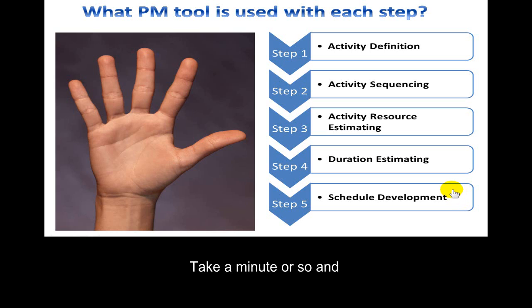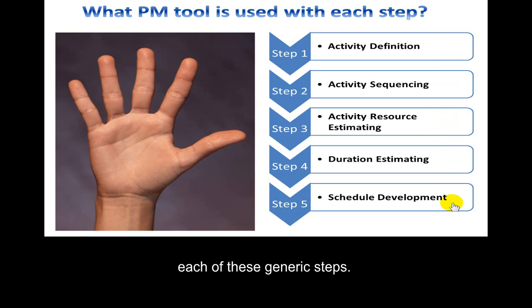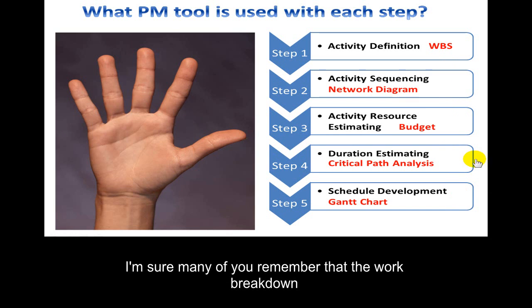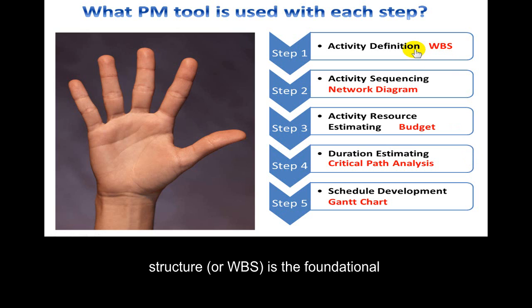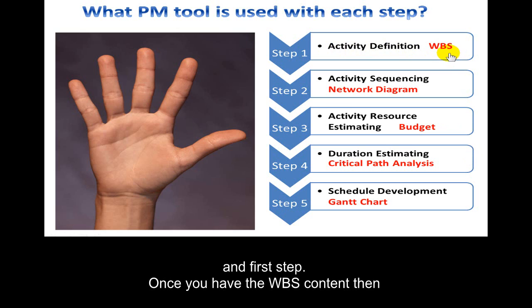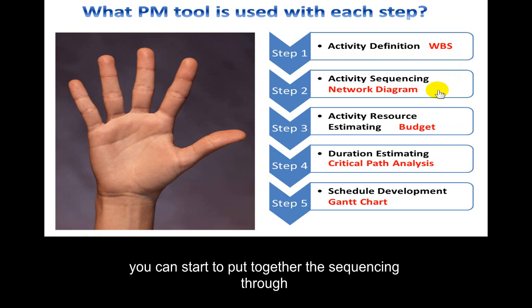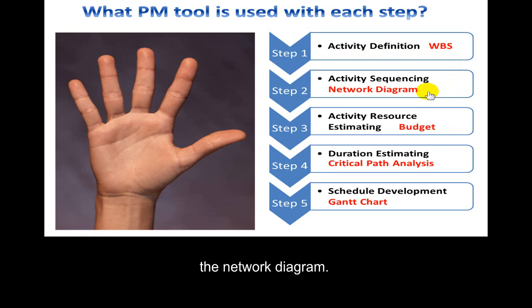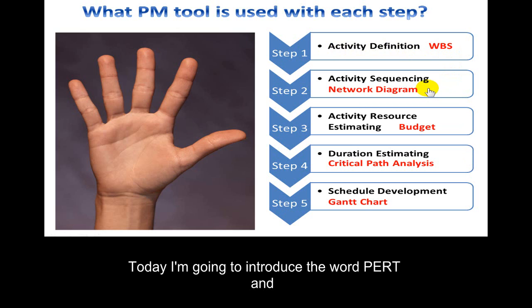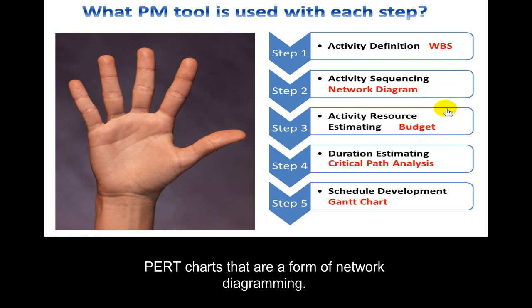Take a minute or so and try to remember what tool is used with each of these generic steps. The Work Breakdown Structure, or WBS, is the foundational and first step. Once you have the WBS content, you can start to put together the sequencing through the network diagram. Today I'm going to introduce the word PERT and PERT charts, which are a form of network diagramming.